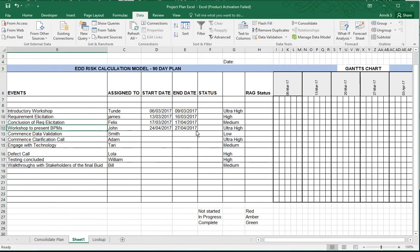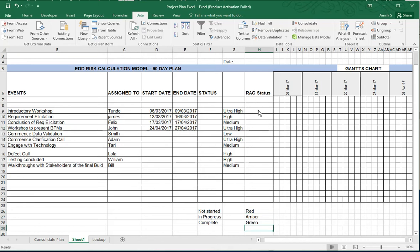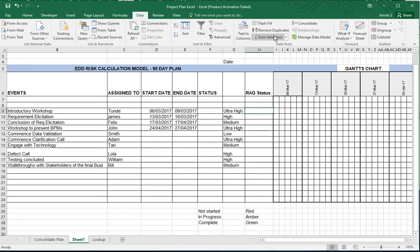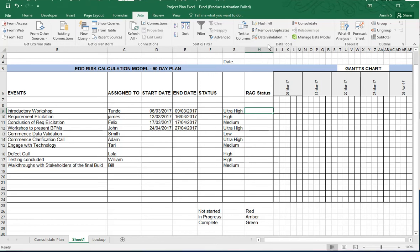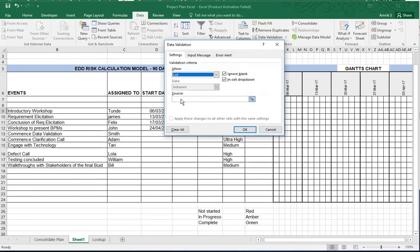I'm just going to show you the RAG status. RAG is usually called Red-Amber-Green and I want to put it here as a dropdown. So what I'll do is select one of the fields. There's two ways of doing this. You can either go to data validation and list and list them all here: red, comma, amber, green, carry on, and then OK.